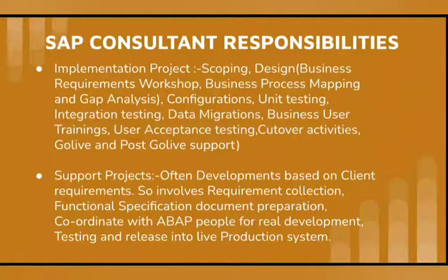And the next one is user acceptance testing. Once the training is done, then user acceptance testing. What is user acceptance testing? Unit testing and integration testing need to be executed by the SAP consultants. But user acceptance testing means the user will execute this business process and test how it is working, and understand the whole business process.